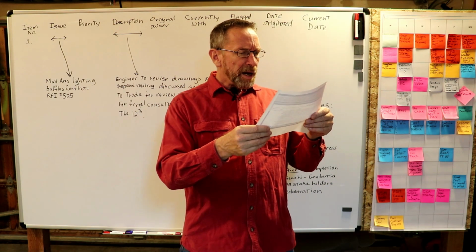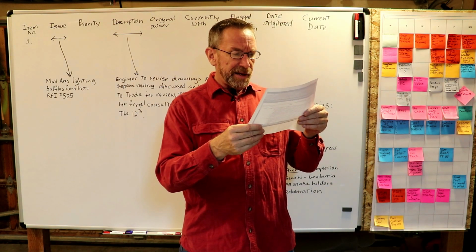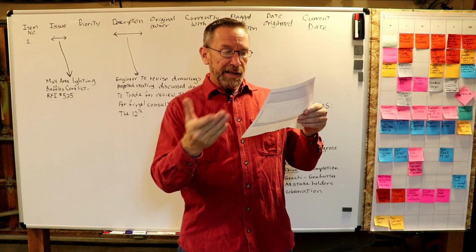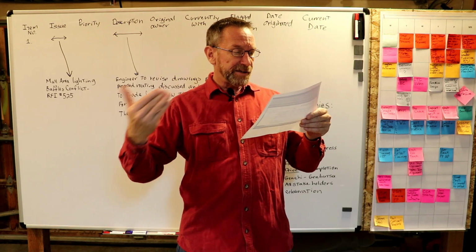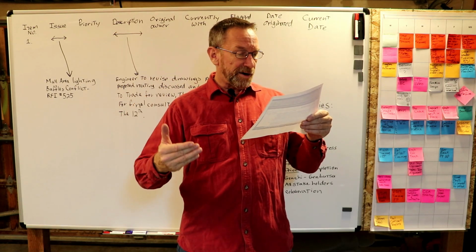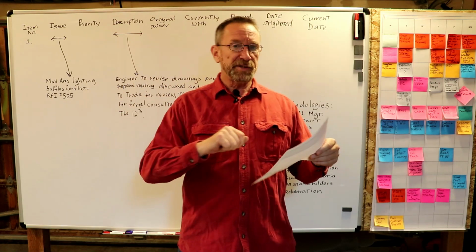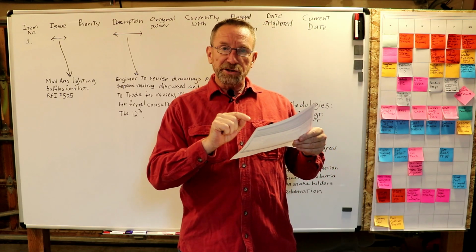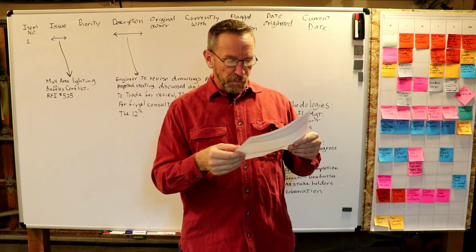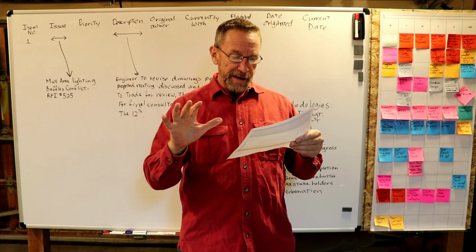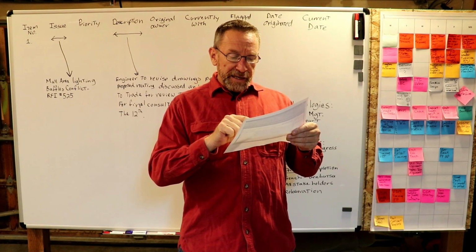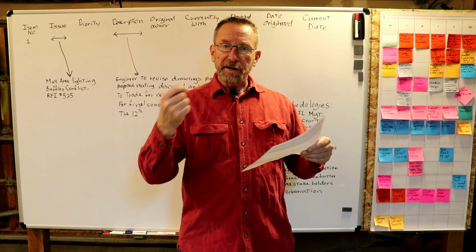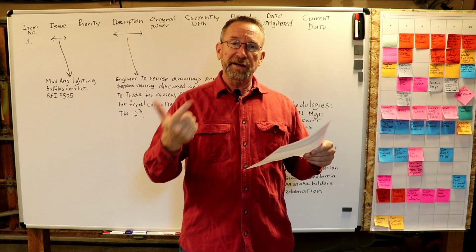So, per coordination meeting yesterday and follow-up email from the trade, the mall area lighting and layout baffle conflict is handed to the engineer and to the architect to issue direction. Okay? Sentence number one. And we know that that's complete. Possible lighting layout change to avoid the baffles. That's one simple sentence. So the next item here is the PE will resend ceiling cloud shop drawings to the architect and the engineer so that they can look at them.